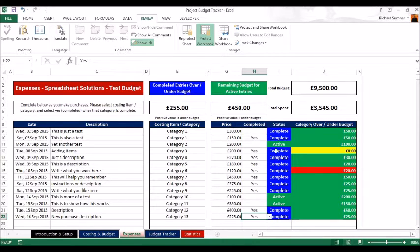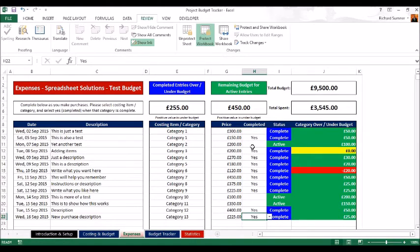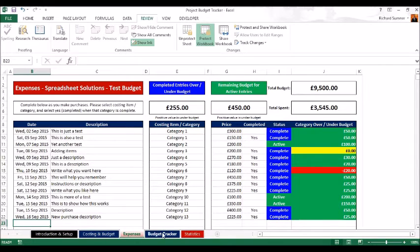Based on completed jobs, the active entries — those three still active — show we've still got 450 pounds to spend on those active jobs. The total spent so far is 3,545 pounds against a nine-and-a-half-thousand-pound total budget. This gives you a running total as you're capturing all your purchases and expenses in their respective columns.